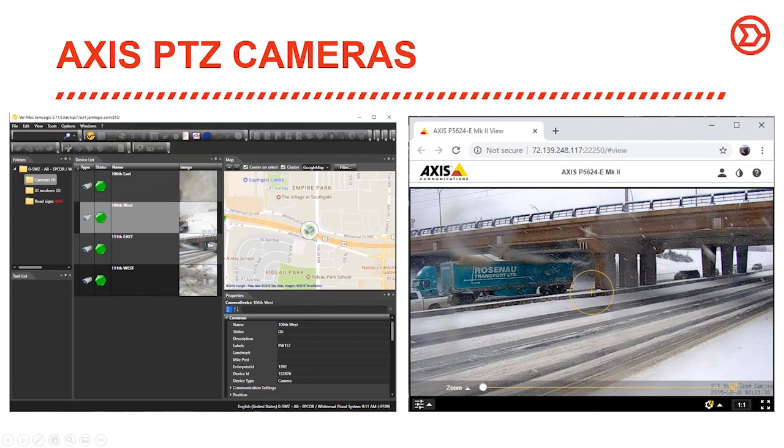So this was, I think, sometime in early January. There was a snowstorm, there was an incident, and we were able to log in and assist EPCOR with determining where that incident happened on this road surface just on the White Mud Drive. So again, using cameras in combination with message boards, arrow boards and trailers just adds another level of engagement and visibility into how well, or potentially on the negative side how poorly, the work zone is working, and that allows you to make changes and understand the changes that need to take place.